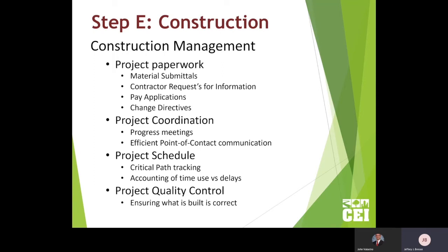I want to hit a few key things on this. There's quite a bit of detail, so I've listed them. But some of the key things I think that I want to cover here is submittals. Submittals means, contractor, I want you to, on every single thing you're going to do, without any exceptions, before you provide it to the school, I want you to send me the paperwork on that. I want you to show that what we're asking for is what we're getting.